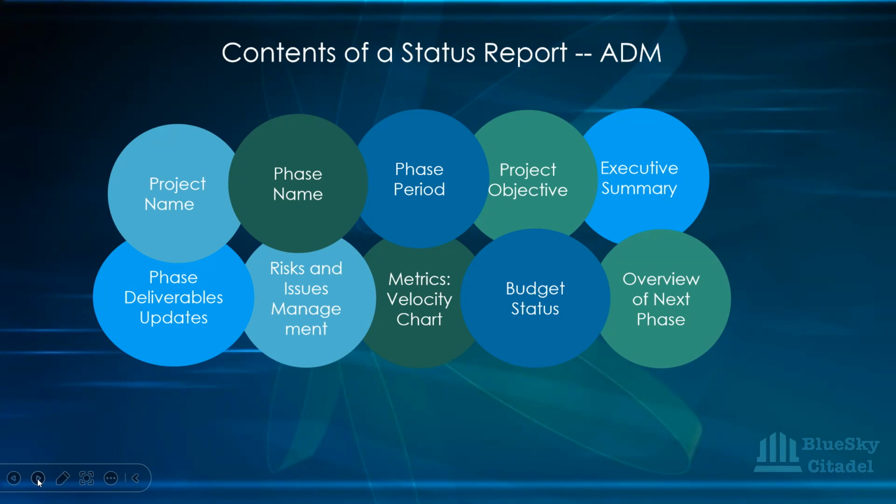Now, not all risks can be kept from becoming an issue. There are some where your hands are tied, and they become an issue. It happens. We're working in an uncertain environment. So when they become an issue, what is the impact to the project? What is the impact on the timeline? What is the cost impact? You want to put all that in your report, because it's not something, like I said, you're just telling them about when it happens. It's something they've been aware of, and you've been keeping them informed. So when it happens, they are prepared for it. They know that it might happen. Who does the cost fall on?